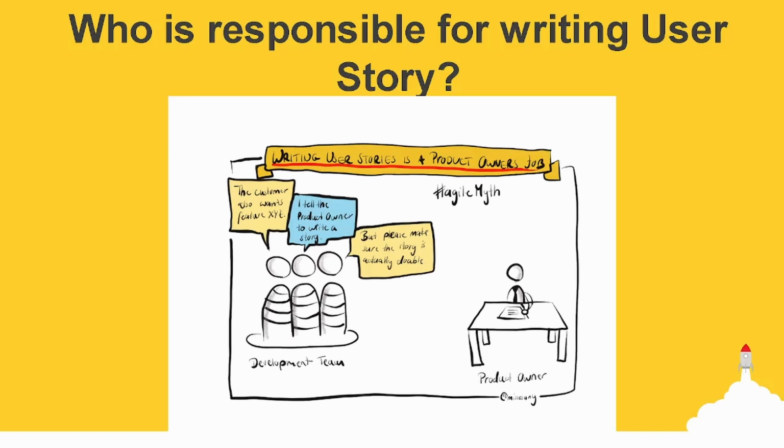During the early stages of product development, the team discusses needs and records them as user stories. As long as there is a product backlog, it will never be frozen. As a result, if someone thinks there is a missing requirement or anything that could benefit the client, they can add it to the queue as a user story. There is no rule or guideline indicating that the user stories must be written solely by the product owner. Because there is a set format, anyone creating the story should know exactly what it means and how to write it.